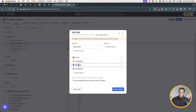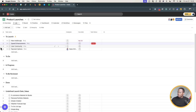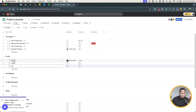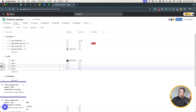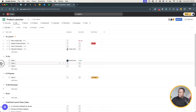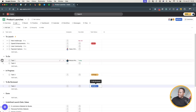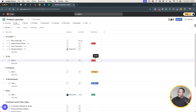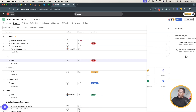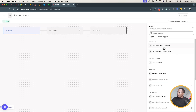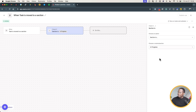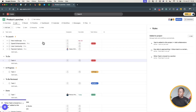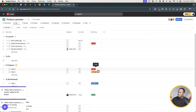Now we have our tasks with assignees and due dates. As we move tasks through the sections, we want to update the Task Status field. What you often see is people going into the Customize section and adding individual rules — for example, 'when task is moved to In Progress, change the status to In Progress' — then publishing that rule and testing it. It works, but then you go back and add another rule: 'when task is moved to To Be Reviewed, change the status to To Be Reviewed.'